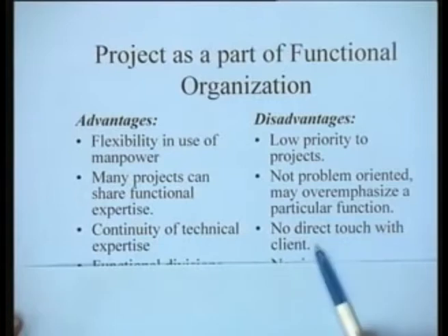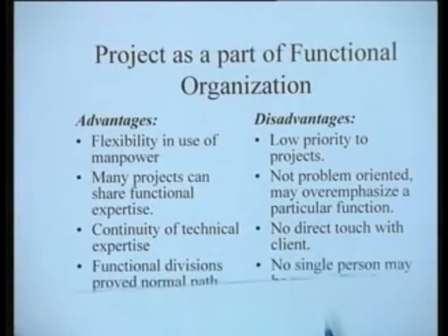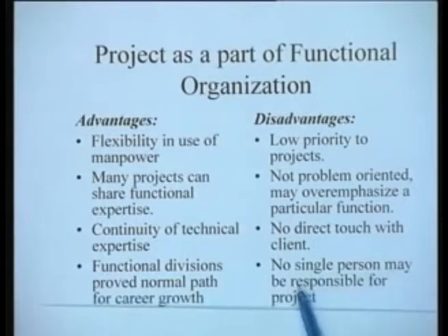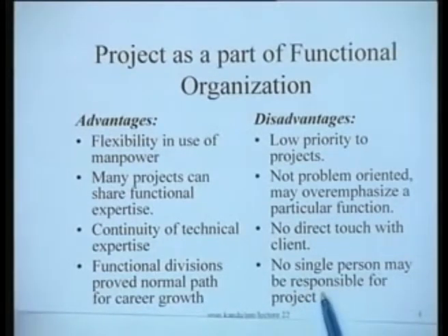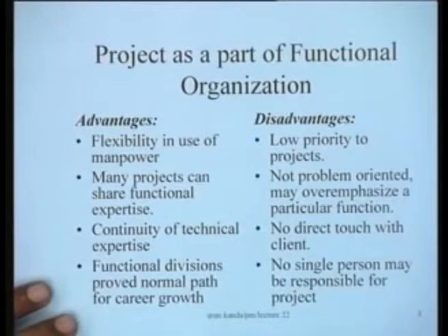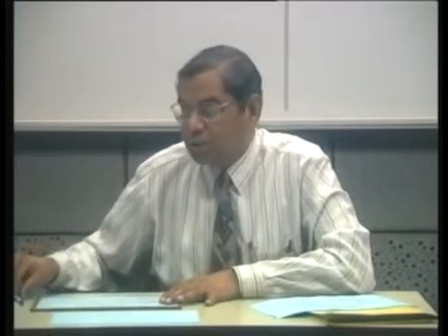There is no direct touch with the client in this particular case, and no single person may be responsible for the project because the project is sort of floating around between the various functional groups, and therefore it is really not a good way to organize a project from that point of view. Probably the best thing that could be done for a single project would be to give it a pure organization, a pure project organization.